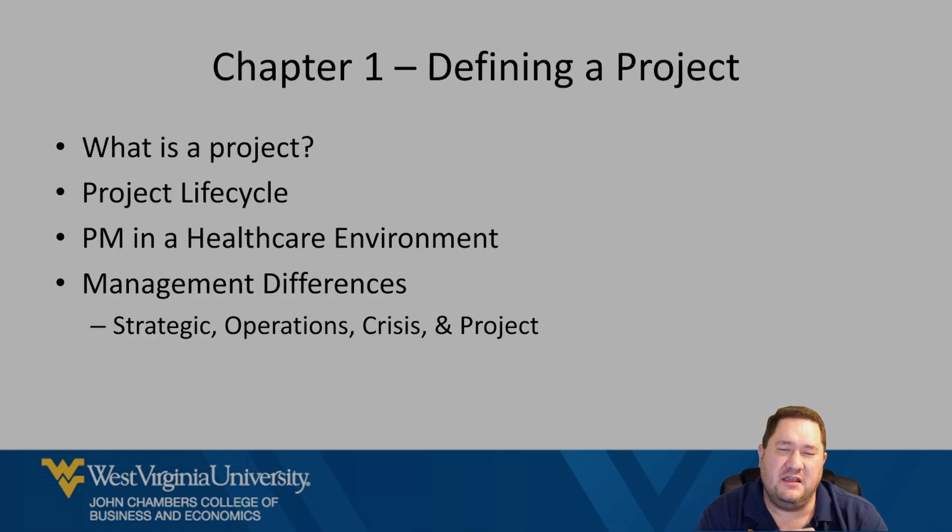And then, of course, at the end, we have a closing phase. We're winding down the project. We're releasing people back to their home departments. We're making sure all the bills are paid. All the paperwork is done. There's a lot of paperwork in project management, as you guys might have already noticed from looking at the syllabus. But it's an effort so later another project manager can take a look at what you did, and that can help guide them in what their project is. They might be doing something similar, but they are not doing something exactly like you did.